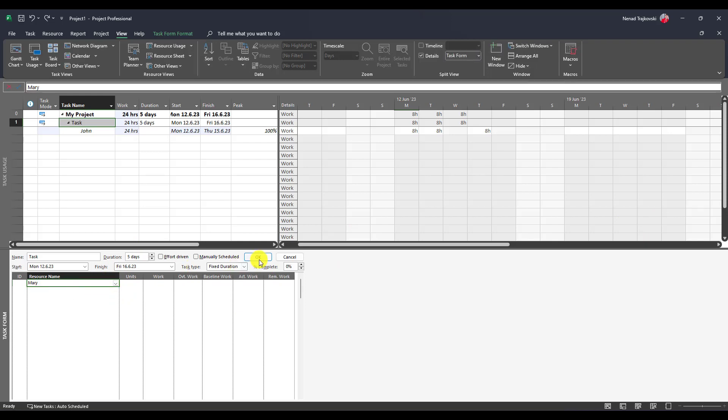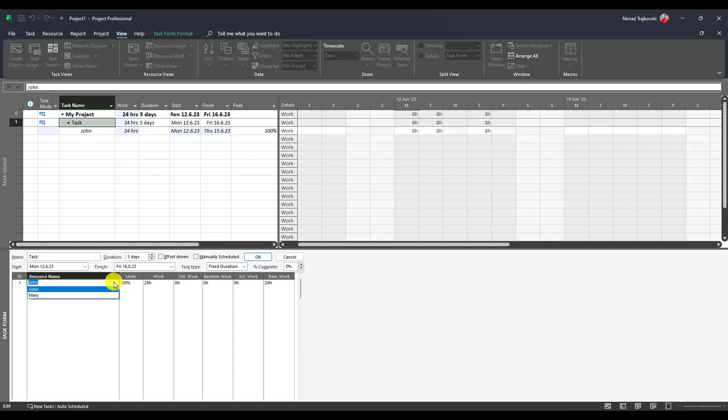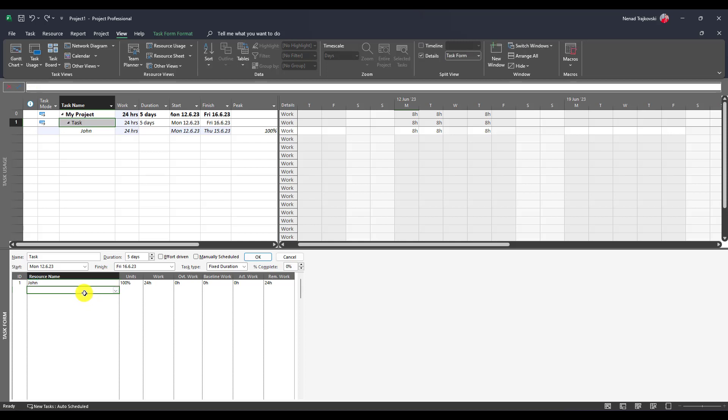What will you have here? Exactly what you want. But don't go here and change John to Mary. It doesn't work as it was expected. It only works when you add another resource and remove, in my case, add Mary and remove John.